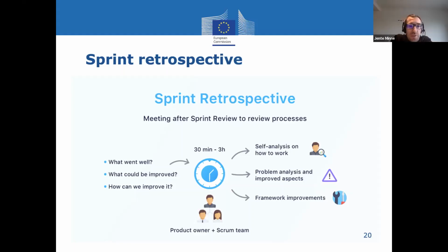Then the sprint retrospective. There you're going to talk more on, okay, how did this sprint work? What could we have done better? What have I done well, and what could I have done better? And there, basically, you will evaluate these 3 weeks of work, and that's the really interesting thing, because in a lot of projects, only at the end of the project, which might take 6 months, a year, you will do this.